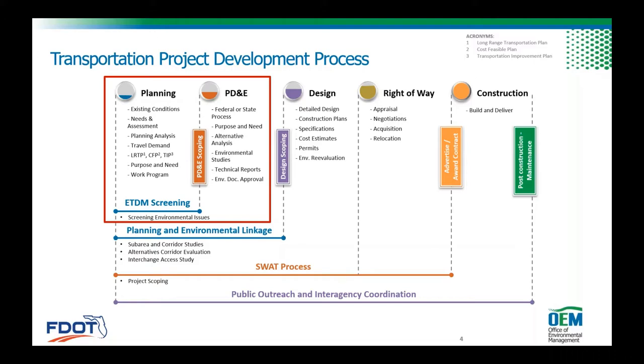So that when we move over into the PD&E stage, we've got some well-vetted transportation improvement projects with a lot of coordination. We have a pretty firm understanding of, if there's going to be consultation, what kind of consultation, if we're going to need sign-off from folks, what type of technical studies are we going to need, how are we going to build the scope for the project, and ultimately, what environmental document is it going to be?